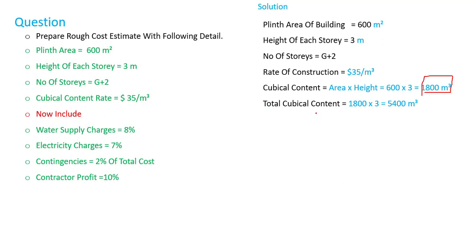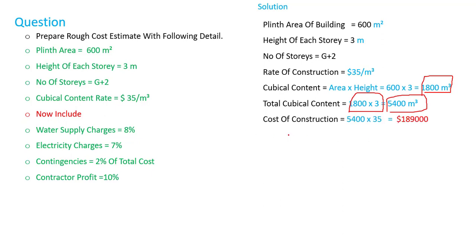The total cubic content equals 1800 multiplied by 3 stories, giving us 5400 cubic meters. The cost of construction: the unit rate is $35 per cubic meter, so we multiply it by the total cubic content.